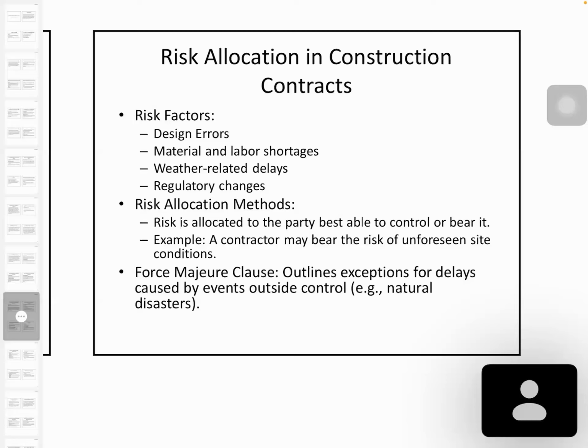For example, here it shows a 10% VAT and it increased to 18%. Then the client is liable to pay the additional VAT portion as well. If you don't have a budget, what are you going to do? Very high risk, the regulatory changes.